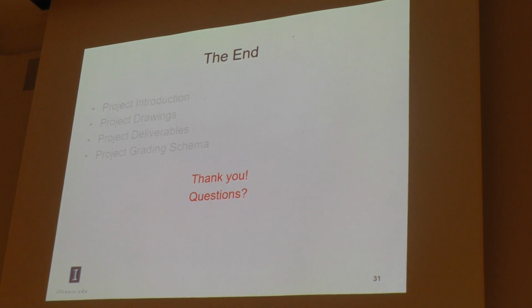Okay, go ahead. In the project document, it's mentioned that the project is in California. So do the detailed RSMeans use the California prices? Yeah, again, the caption here is the project is located in California. When we are doing detailed cost estimate, we need to consider the location of California. Because in the following part, you said talk to local.